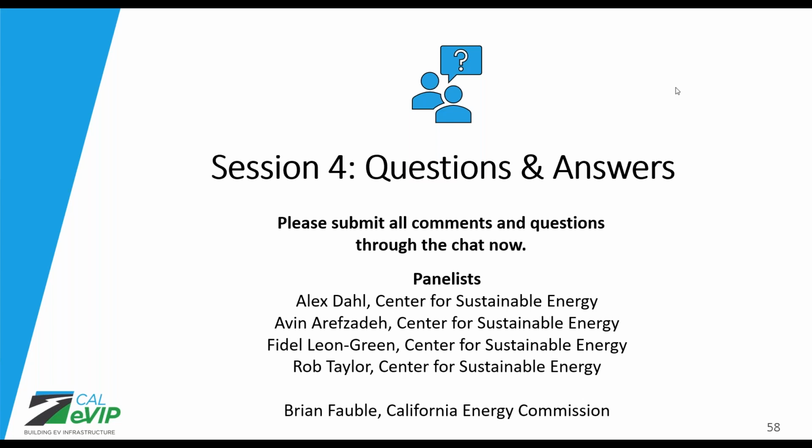Okay. And then another question for you, Alex. Is a line item budget required to be submitted as required documentation, and where is that within the application process? Yes, we will be asking you for the line item of expenses, and that will be submitted at the very end of your project. We also are going to create a resource guide of eligible costs and how to submit those, and that will be on the GSPP website in the coming weeks.